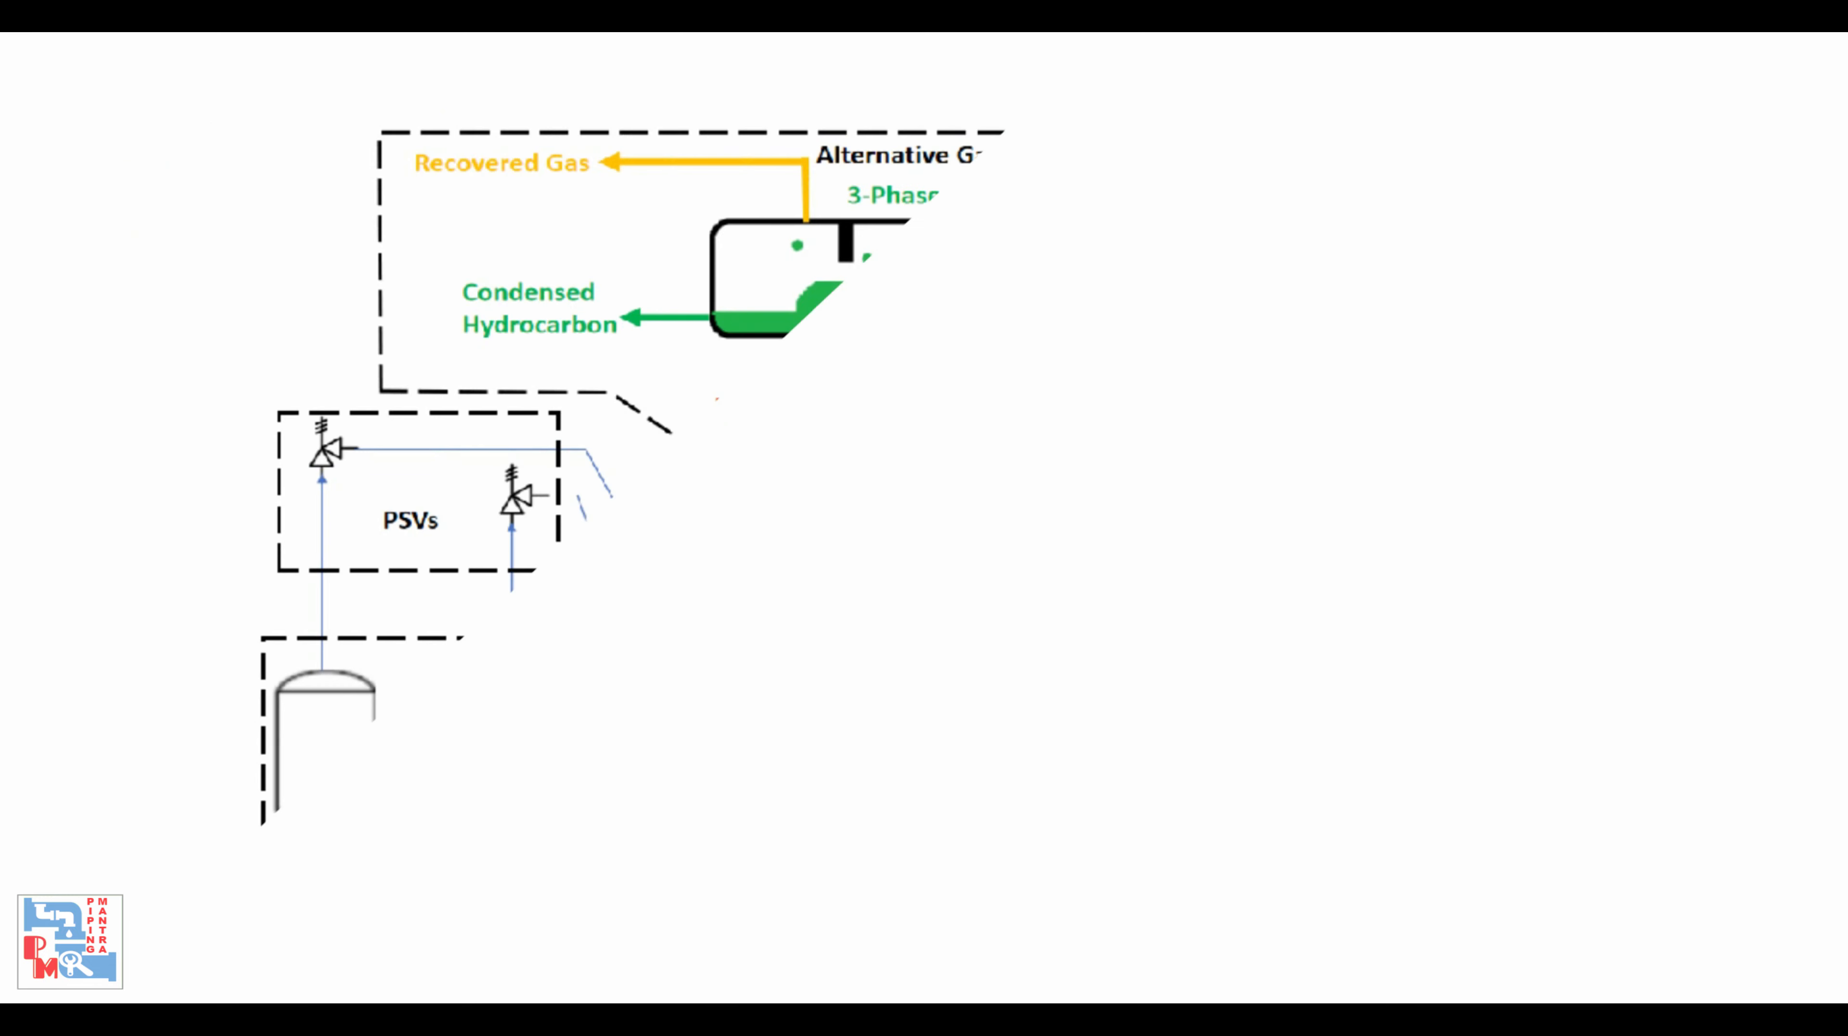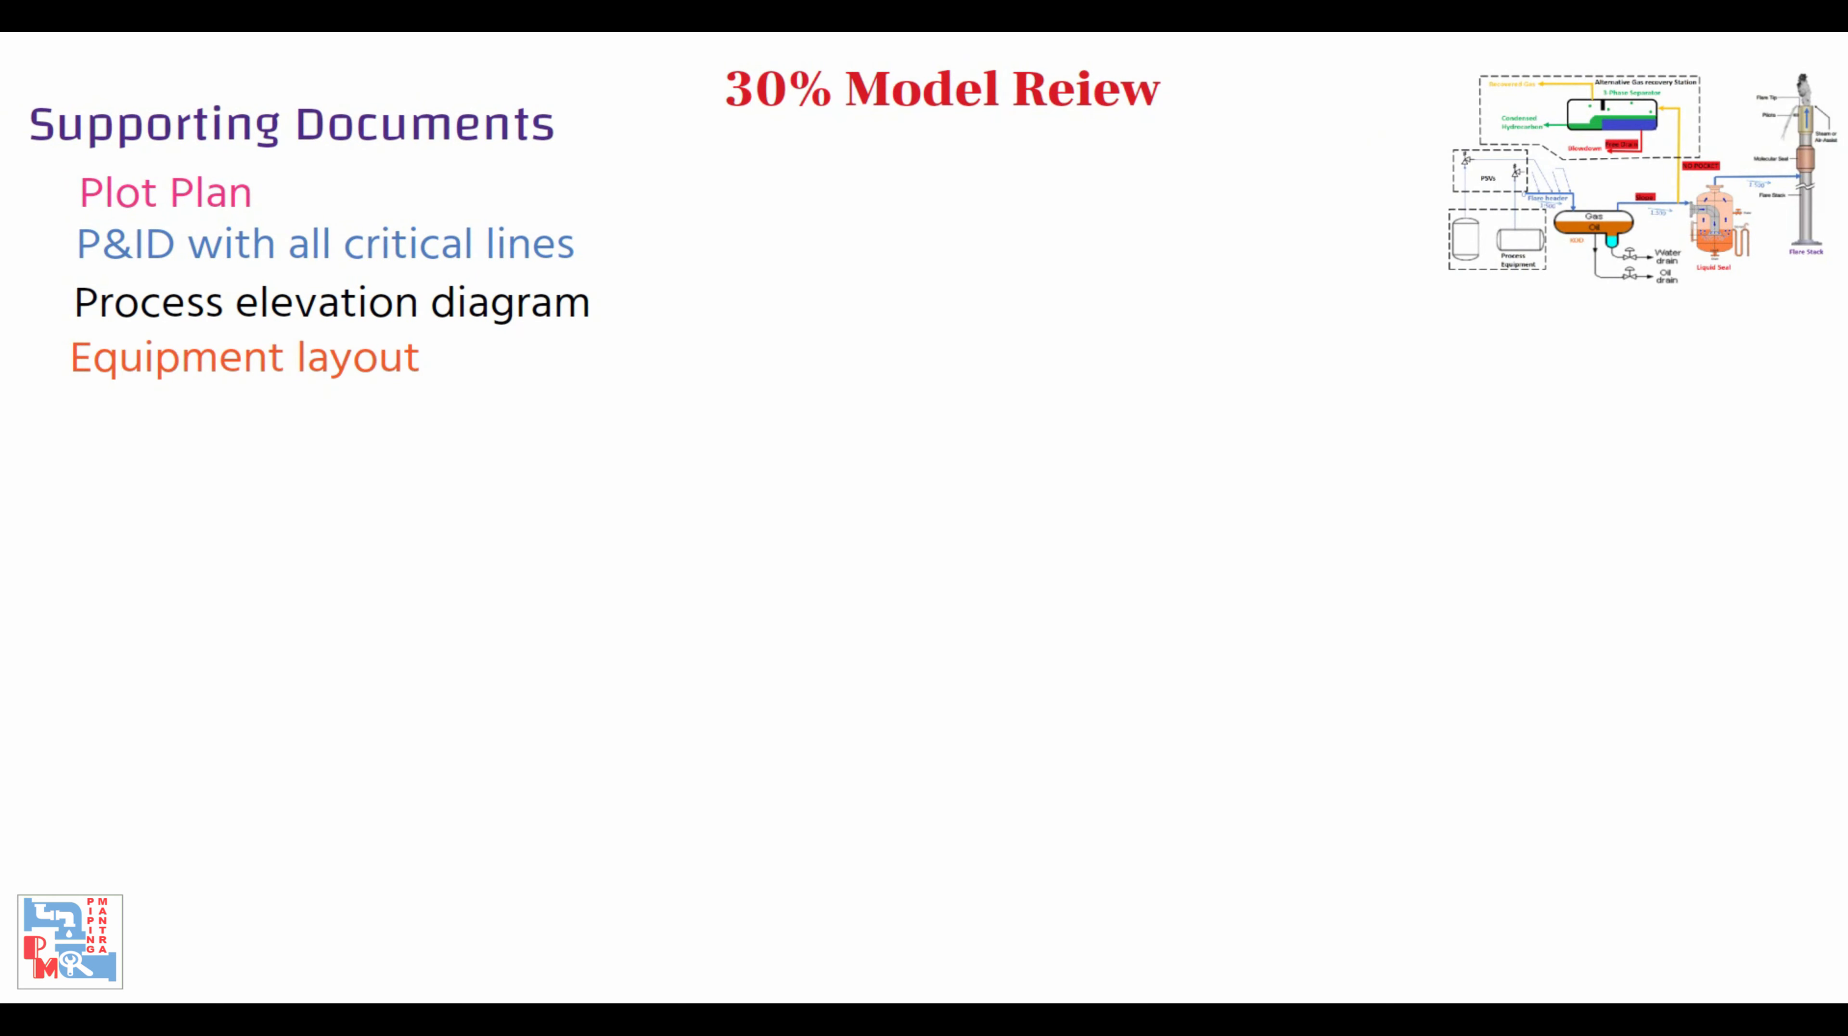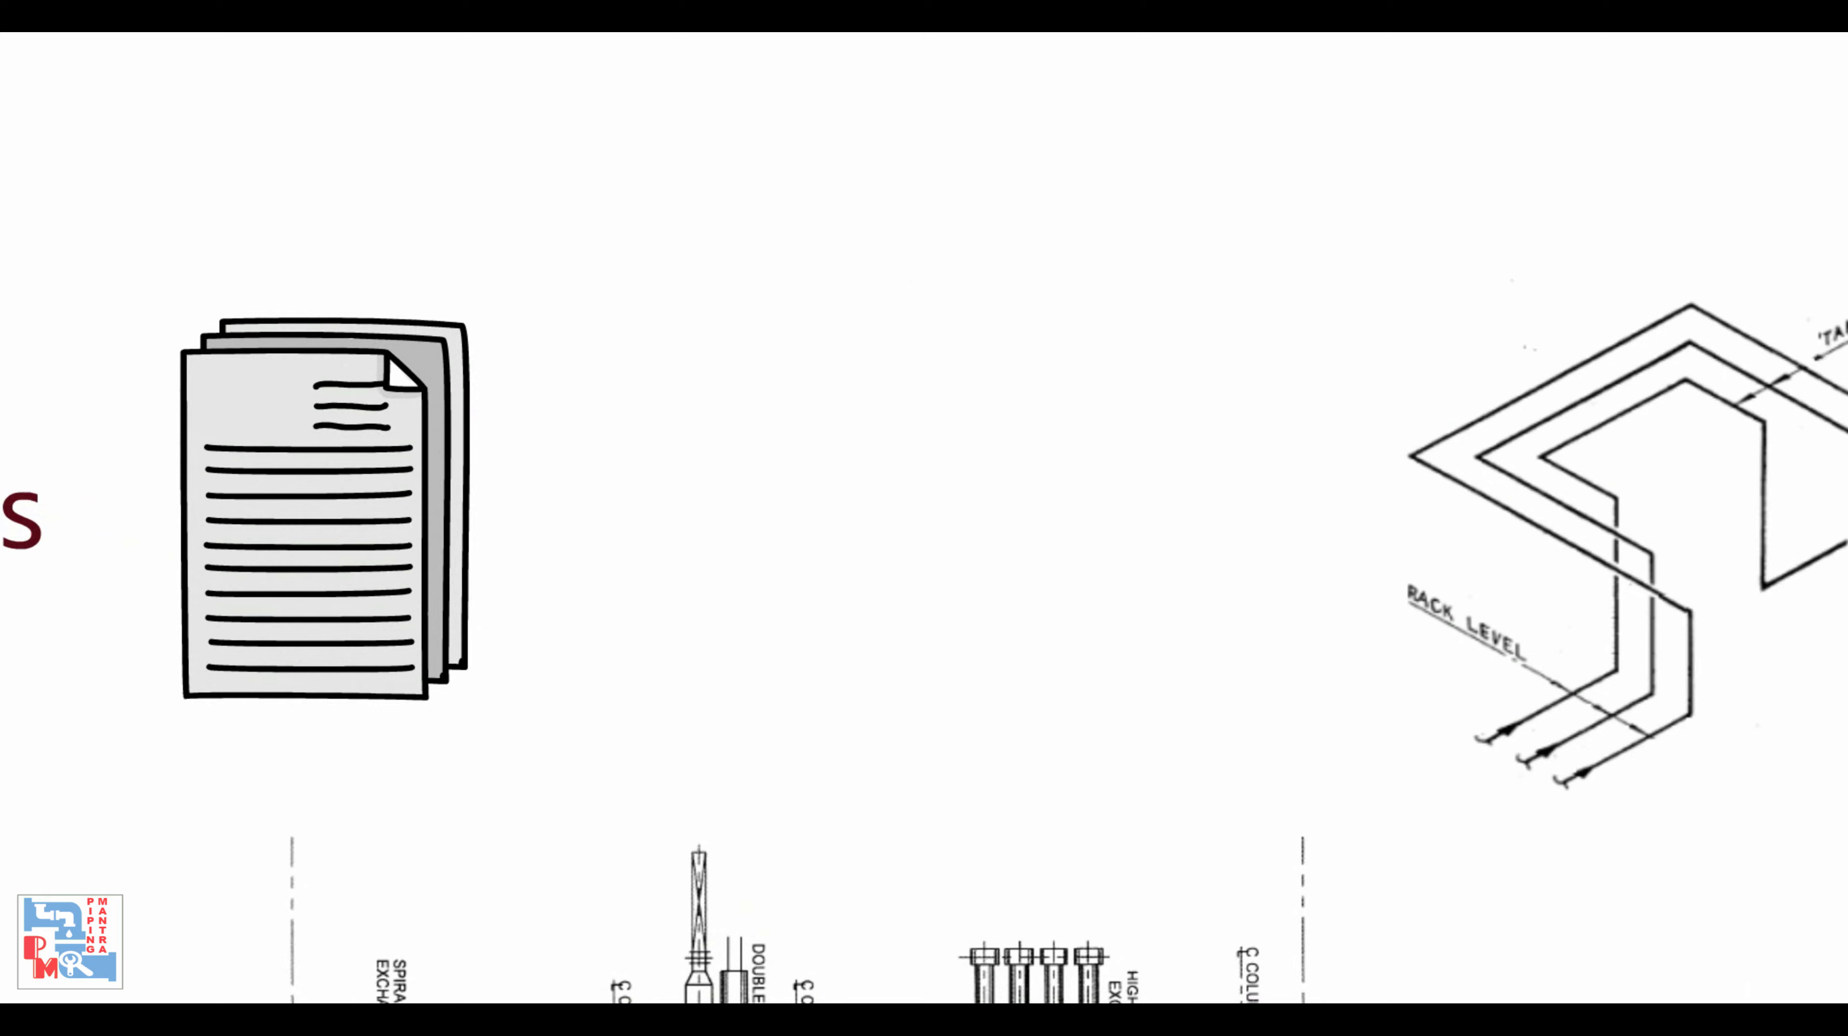The supporting documents required for a 30% model review are: plot plan, P&ID where line size is given for all critical lines, process elevation diagram where it has mentioned no pocket or free draining requirement between two equipments, equipment layout showing all the equipment and the preliminary location, piping spec, preliminary stress analysis to test critical lines to finalize loop locations.